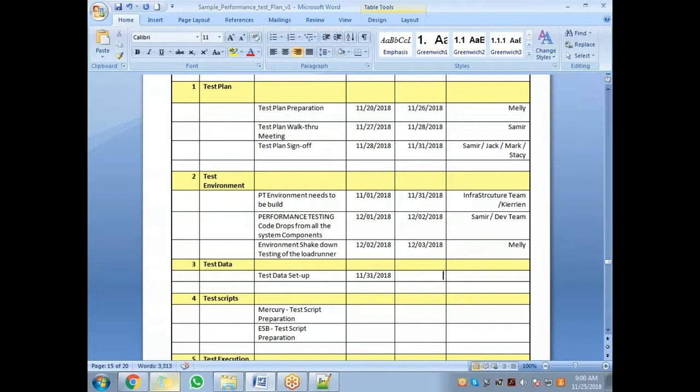Let's say you need 1 week for that, so 12/07/2018. Again, who will help you with the test data setup? The DB team. Let's say you can put a proper person's name from the DB team over here. Then maybe your lead should be coordinating with the development team to get it done. It is the ownership of the DB team and Samir to get the test data done by this time. Or maybe you can give one more week, because test data setup takes a lot of time. Maybe you're giving 2 weeks.